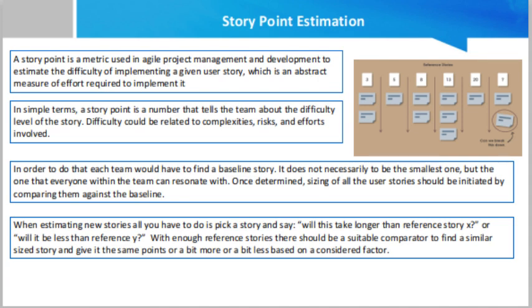Story point estimation includes 3 main components. Risk: the risk of a particular project or item includes vague demands, dependence on a third party, or changes mid-task. Complexity: this component is determined by how difficult the feature is to develop. Repetition: this component is determined by how familiar the team member is with the feature and how monotonous certain tasks are within development. By incorporating the 3 points above, your team can more accurately plan sprints, include cushion for uncertainty, better estimate issues, and avoid leaning too heavily on time commitments.